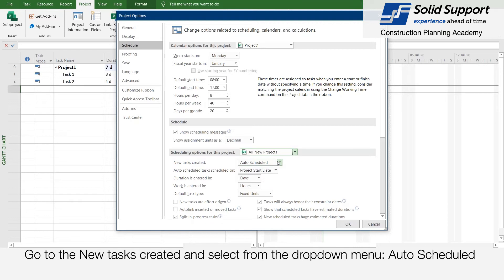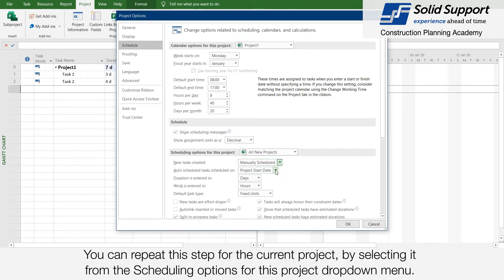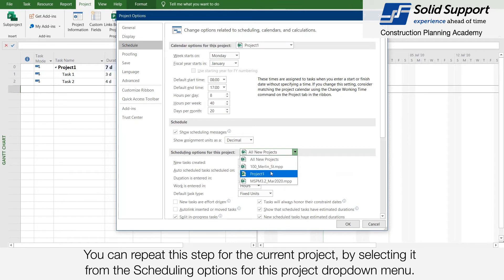Go to New Task Created and select from the drop-down menu: Auto Schedule. You can repeat this step for the current project by selecting it from the Scheduling Options for this project drop-down menu.